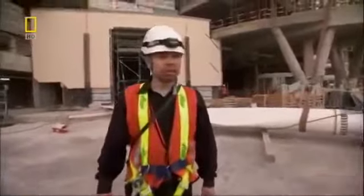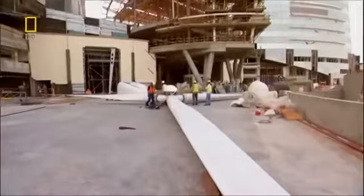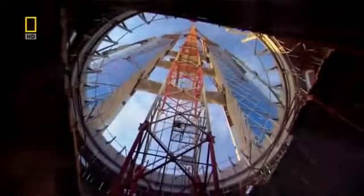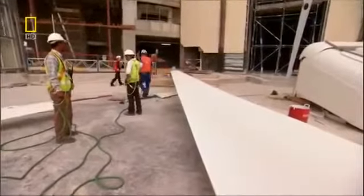In addition to wind speed, the engineers also need to consider the wind's direction when they raise the blades. Because if you have a lot of wind on one side and no wind on the other side, it will be more difficult to control the rotor. The diameter of the assembled blades measures 29.2 meters. This is just 3.8 meters less than the span between the buildings. A collision would mean a huge loss of money and time.